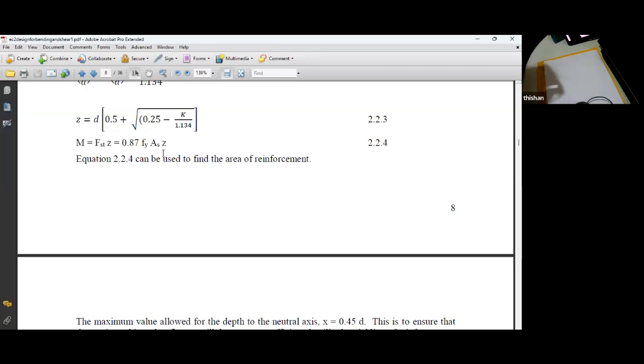Then the client will allow a solution under an agreement according to FIDIC conditions of contract. When you do value engineering, 50% belongs to the client.